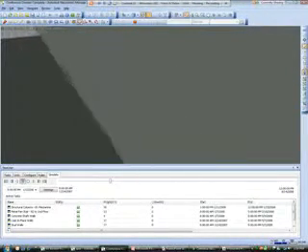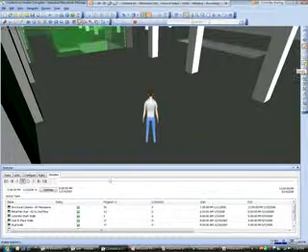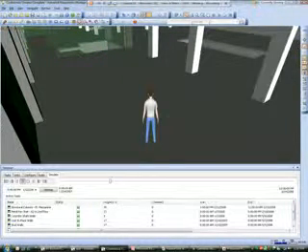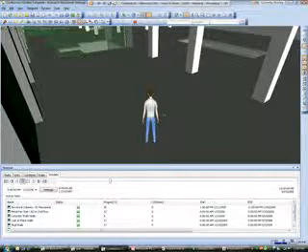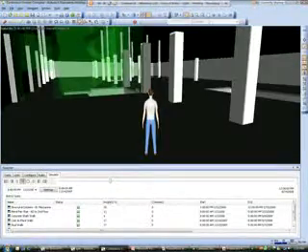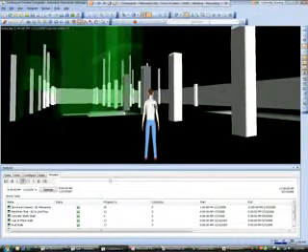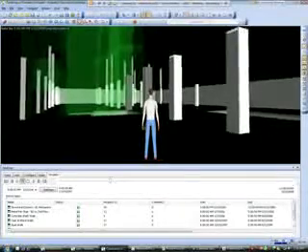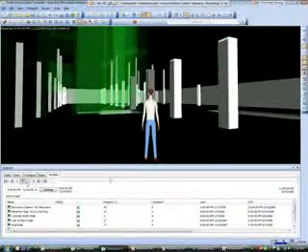Let me just go through the wall here. This gives us the opportunity to start looking for areas where maybe we need to take into account more safety. For example, if we have some openings in the ground, we need to be able to make sure those are properly cordoned off. But with this now, I can virtually walk through the site and I can see the proper sequence of this. So it gives me a different perspective. It takes me into the view of the superintendent. Now I'm able to walk around virtually while this project is going together.